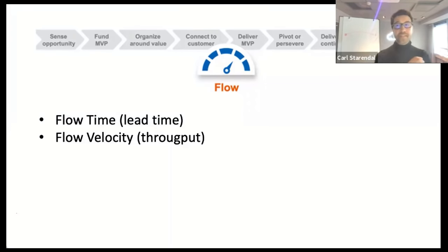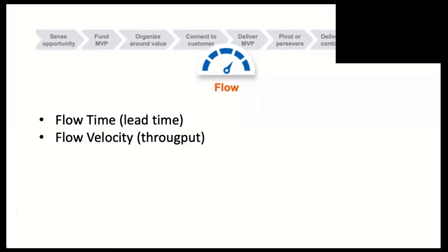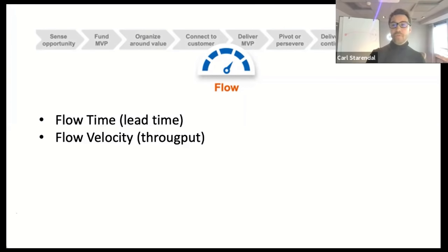That's a much harder data set to get, because now you need a grasp on the size of a story point and so on across the ART. And also, you might be looking for a false positive here. My go-to would be just the number of features completed per PI, looking at the throughput data. That would also help me forecast if needed.